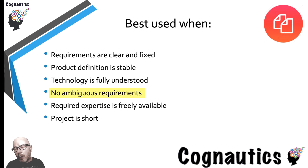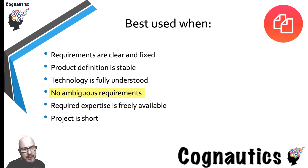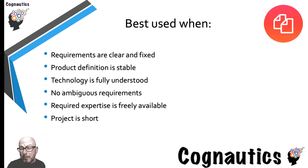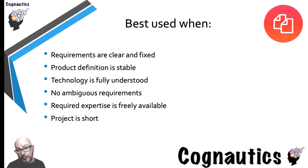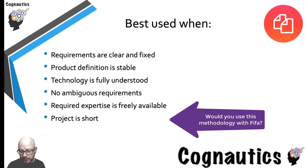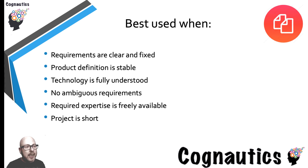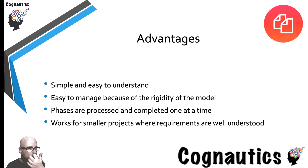Compare that to writing an app for virtual reality, where the software and hardware is constantly changing — a fantastic idea in June could be completely changed by a new hardware release in July. With FIFA you won't have that. The requirements also can't be ambiguous; they must be clear for the waterfall method to work. The expertise and manpower need to be freely available when required, and this methodology works really well when the project is short and well-defined.